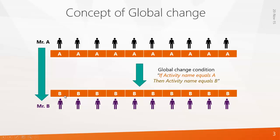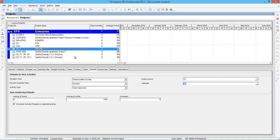Same way you can do this global change for resource assignment. Let's say Mr. A is working for all these activities. If you want to change it to Mr. B instead of changing it one by one, you can change it in one shot using global change. So we will see how global change works in Primavera with an example.